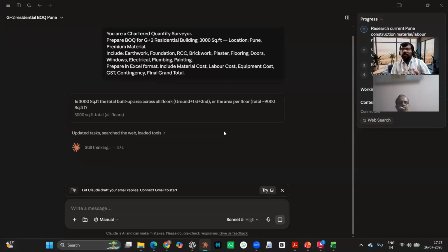Claude or AI will communicate with the client automatically in the format, and you just send the email. This is your requirement, this is your actual cost against your budget, this is what we have assumed as per your requirement, and what you want to change. That communication takes at least one week when you manually calculate the quantities, right? If you use the AI automated flow, it takes 2 to 3 days. If the client is very prompt or responsive, it can take 1 day as well.